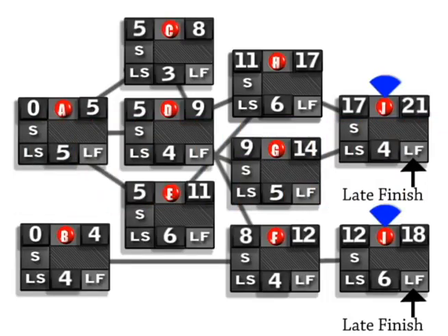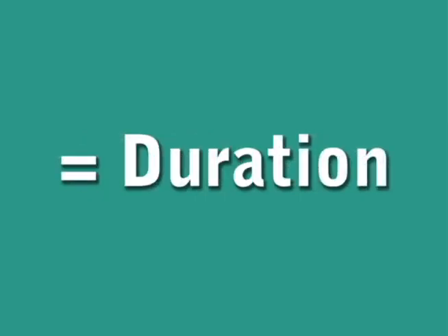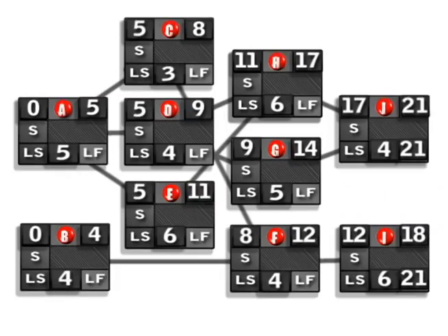But we have to get started on this. We have 2 ending activities. And I know when you were in class, you probably never saw this because all of the ones that we did had just 1 ending activity. When you have 2 ending activities, you have to select between the 2 times. So for activity J, which is an ending activity, it's 21 weeks. And for activity I, it is 18 weeks. Well, for both of these activities, we're going to use 21 to start our backwards pass, because remember, 21 weeks equals the duration of the project. Everything has to be completed in 21 weeks.